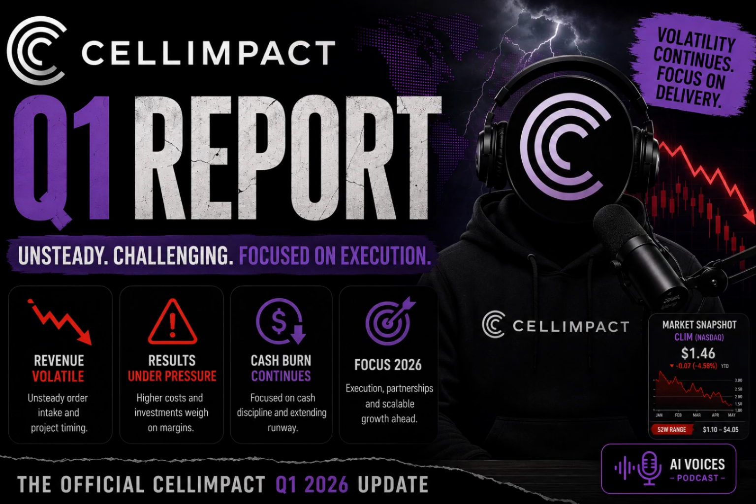It sure doesn't. So early in Q1, Cellimpact goes back to the customer and basically deconstructs the contract. They agree to a new deal where the customer pays them 6 million SEK right now for the preparatory activities that Cellimpact had already completed. Specifically, building the custom tooling and fixtures required for the eventual production run. It's such an incredibly pragmatic maneuver.